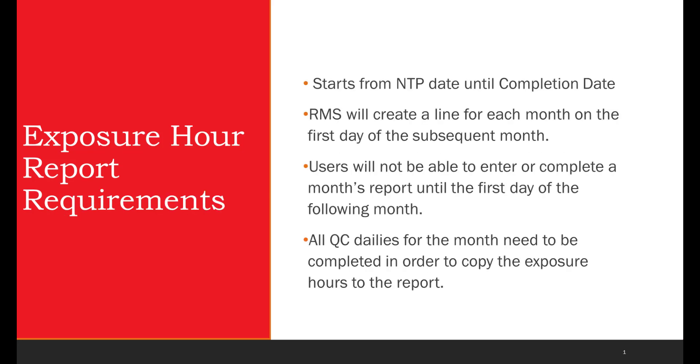Exposure hour report requirements: It starts from the NTP date until completion date. RMS will create a line for each month on the first day of the subsequent month. Users will not be able to enter or complete a monthly report until the first day of the following month. All QC dailies for the month need to be completed in order to copy the exposure hours to the report.